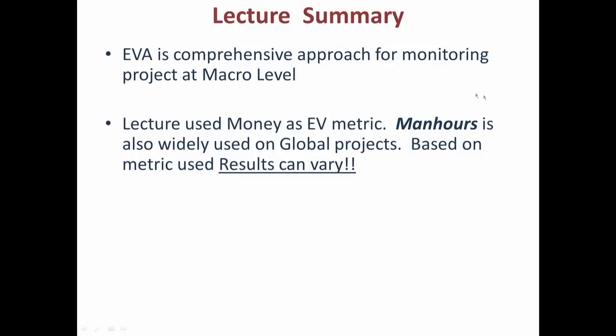If you control man-hours, you control the project and the money spent on it. In many places, controlling man-hours also controls the schedule better than a money metric. Most projects in India use money because labor has historically been considered cheap and tracked by expenditure rather than man-hours. But with increasing labor costs, man-hours is becoming more important.